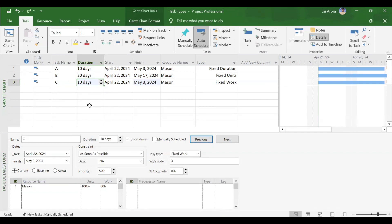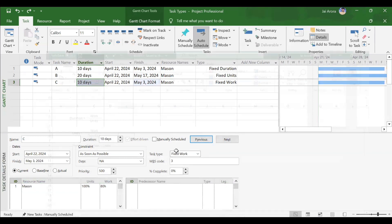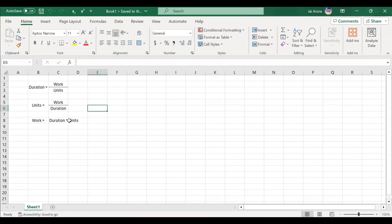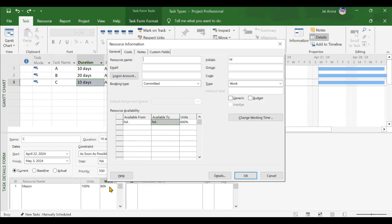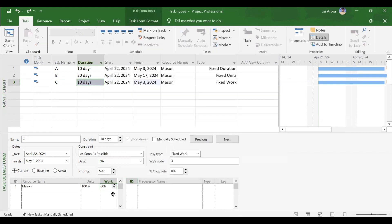Last case for fixed work: increasing work itself. Units will remain the same, so duration will change. Work is becoming 160 hours and units is still 1, so duration will double. Increasing work to 160 and clicking OK confirms duration has now become 20 days. This covers all cases for fixed work type task in Microsoft Project.